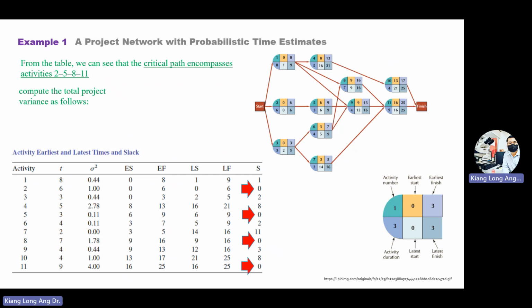But what is important is to observe the solution steps for what we're trying to do here. First we build a table, then you find the mean time, you find the variance, then you build the 6 rubrics, and then you find slack time, or from the rubrics you find the critical component.